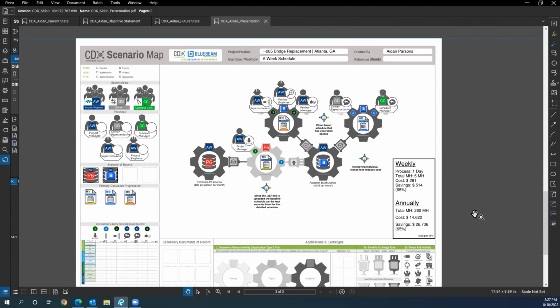Honestly, at Procore, we still struggle with the same thing, but again, it's all with controls. There has to be some sort of trust but verify, while keeping the big picture in mind. You may be making changes in a 6-week schedule, but it may push or affect something longer term. But that's why you have a schedule manager, because they're the ones who can provide that feedback. So you have that feedback loop with the schedule manager and then do the updates.